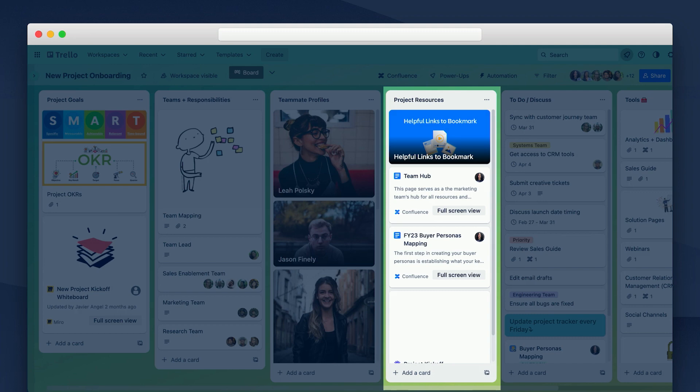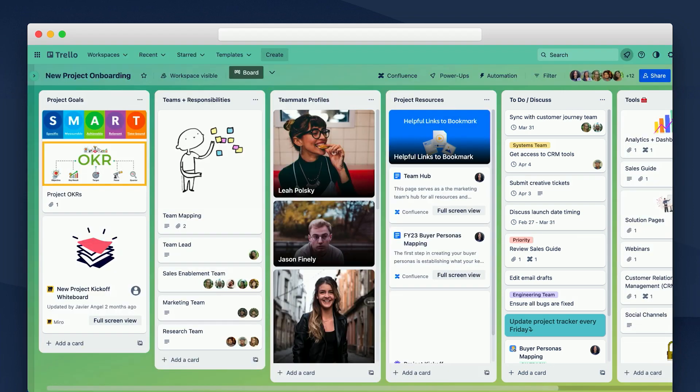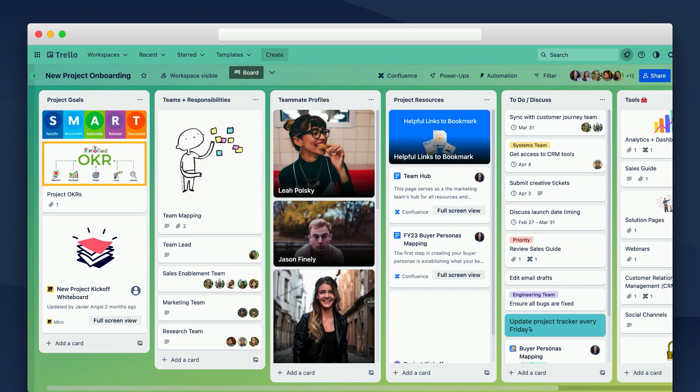And then we have another list here with project resources. Again, Confluence pages that detail relevant information and historical context, all in a manner that teams can quickly and easily access without having to search for it. And then finally, we have a list here with all the tasks that need to be completed in order to ship our project, along with due dates and assigned owners. Similarly, we can use labels to highlight priority tasks and any team that we might have dependencies on. Using the same framework that we did for onboarding a new hire, our new initiative has now gone from an ambitious vision to a well-organized, actionable plan with clear milestones and owners.